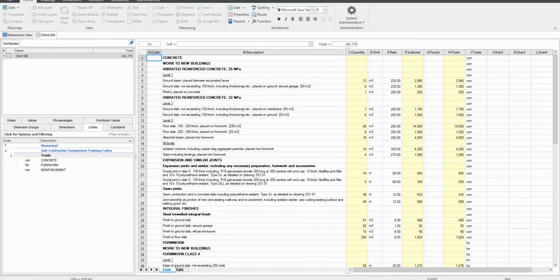When a bill of quantity is received from a quantity surveyor or client, this powerful feature allows quoted or alternate prices from various trades and suppliers to be compared and brought back into the received BOQ. A subcontractor comparison report can also be produced to show the various trade prices and quotes with different colors indicating a different status. In this example, we're creating a new project.